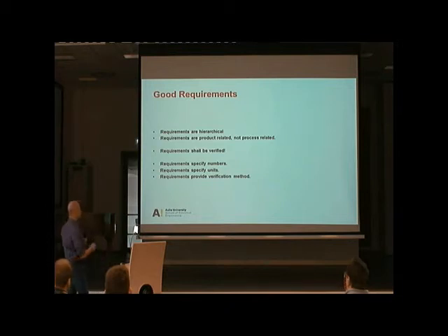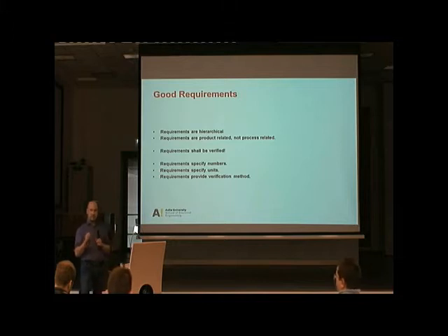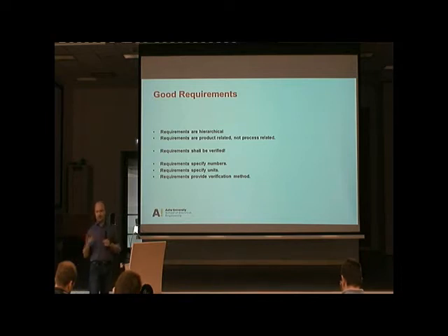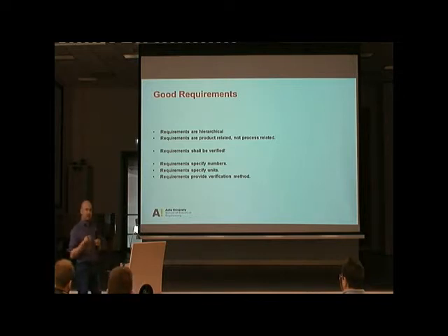The key feature of every single requirement is that it should be possible to verify. If it's not possible to verify whether I am actually fulfilling the requirement, it's not a requirement. Requirements have numbers, requirements have units, or they specify something in a way that, through inspection, measurement, test, or something else, you can verify that this requirement is met. So these are the basic properties of requirements.